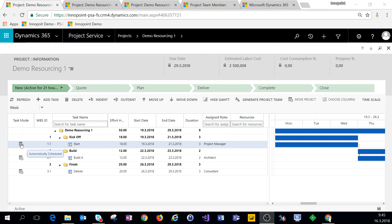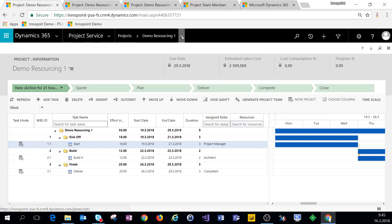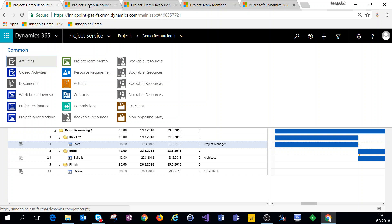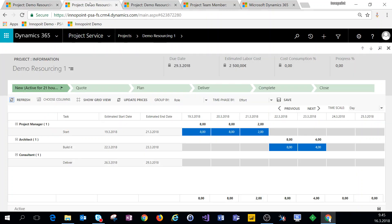The difference between those two is how the effort is distributed for the tasks. With an automatically scheduled task, if we navigate from related records to project estimates, we can see that the effort is front-loaded — 8 hours on the 19th, 8 hours on the 20th, and 2 hours on the 21st.